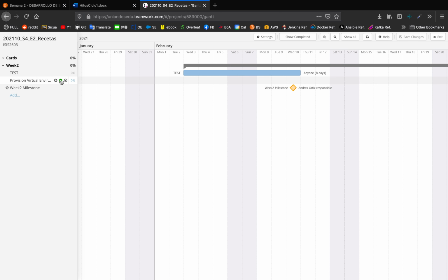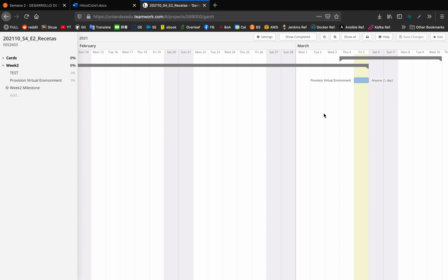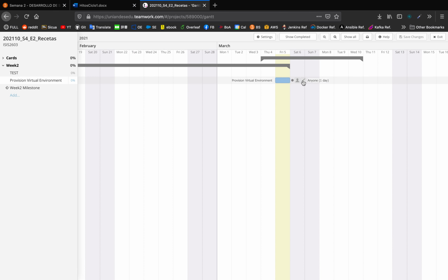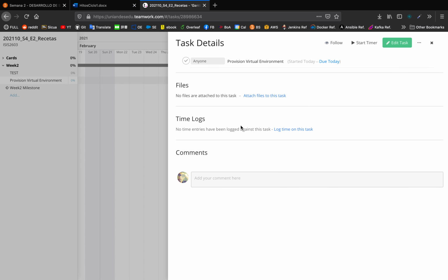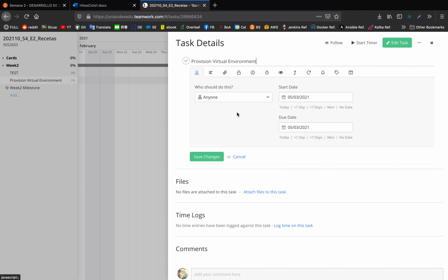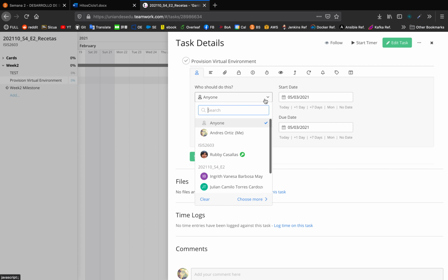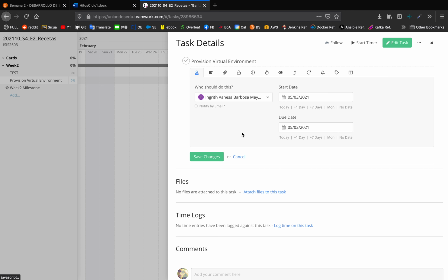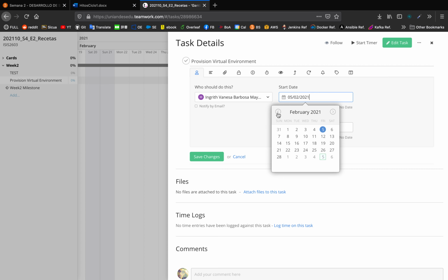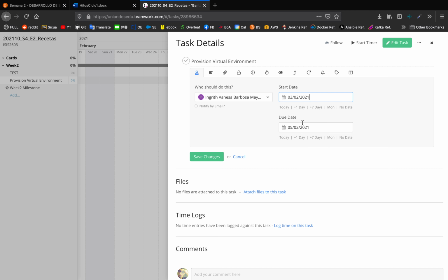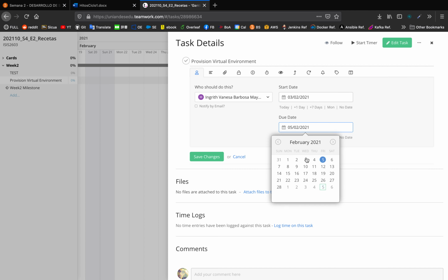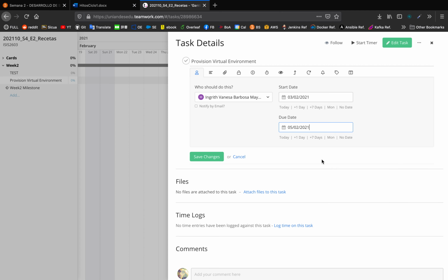Now, this creates a task, but it's going to make it way over here since I'm doing this in the past. Now, when we create a task, it's very important that we do this, guys. We're going to go over here and hit edit. Now, here, we're going to say who should do this. Now, we're going to create one for each person, okay? Each individual person has to do this. So, once again, we'll say that this is to start on the 3rd, and maybe we'll finish this on the 4th, maybe. Or maybe on the 5th would probably be valid, okay?